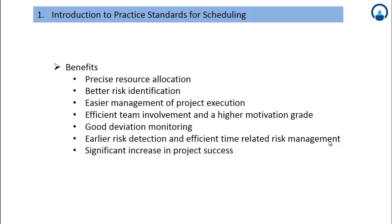The practice standards for scheduling also answers questions such as: who will be involved, what approach will be taken to plan the schedule, and what processes and procedures will be used to create it. It also addresses external enterprise factors — whether work authorization is required, whether the organization has preferred project management software, or whether the project will include selecting a scheduling software product. The process should answer how the project will be effectively managed and controlled to the schedule baseline and how schedule variance will be managed.